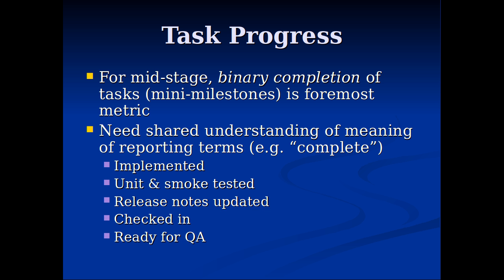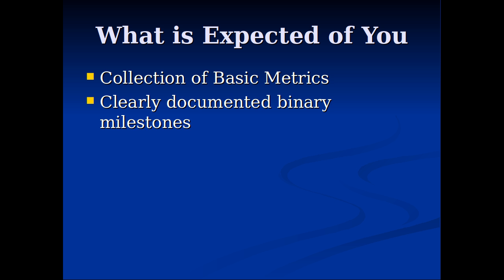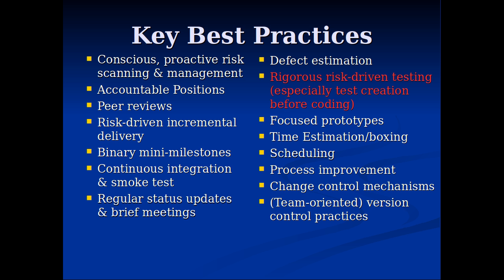Does this mean it will never come back? Not at all. The fact that it's done means it's ready for quality assurance — maybe it'll come back, but at least we know this iteration is complete. Project managers need to get beyond 'it's mostly done' to 'it is checked in and ready to go.' I'm looking for basic metrics and binary milestones — what were the steps needed for this deliverable so you can check them off. For your sake, you want to know: these are the steps we need to undertake to have a hope of getting it in on time.